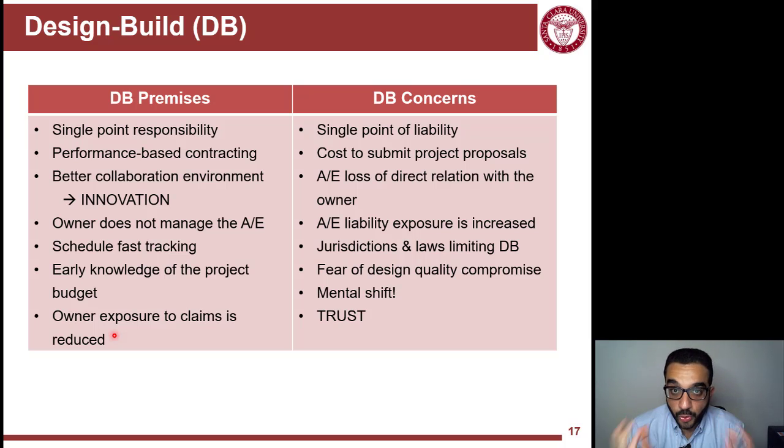The exposure of liability to the architect and engineers is now increased. Typically, they're not exposed to liability that much. So in a design builder, they are exposed to more liability now because they are hand in hand with the builder building this building. Sometimes the jurisdictions and laws limit design build, especially for public agencies, cities, counties.